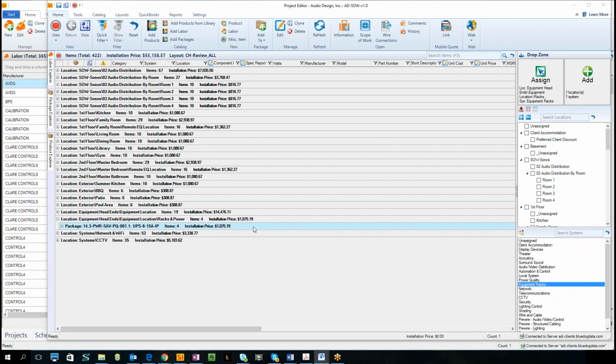So basically build our whole package, add everything in, and then just, call it copy and paste, as far as a new product. Say I'm $300 over what I want my actual drop to cost. Yep. Then do a negative $300 labor cost adjustment, and then add that into the package, and then my package will be right where I need it to be. Exactly. Be the dollars that you want.